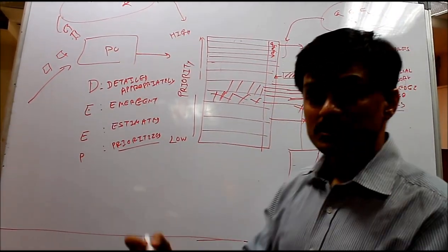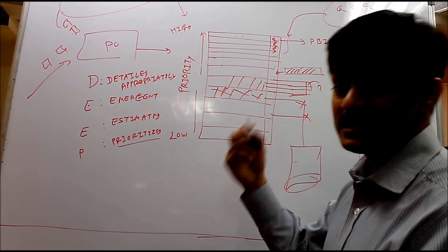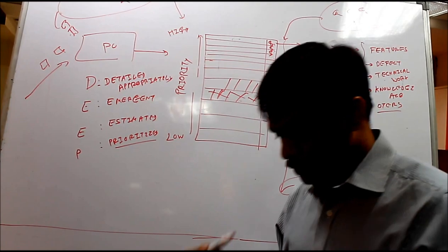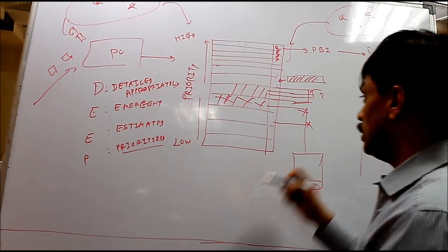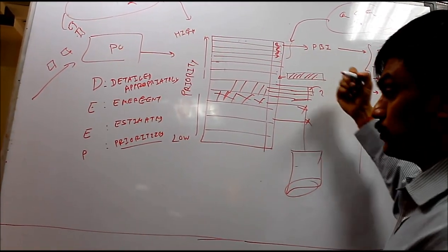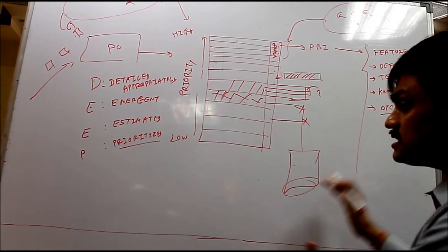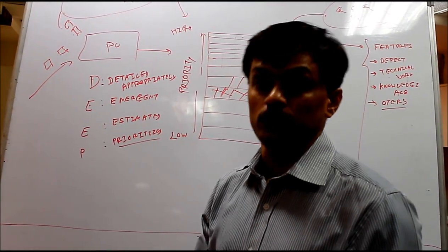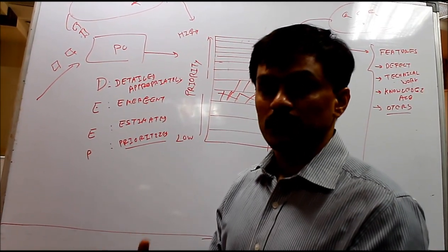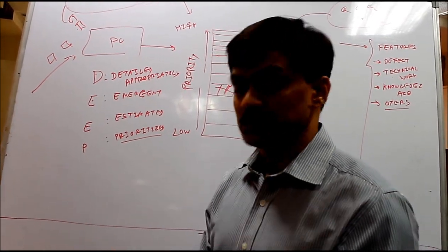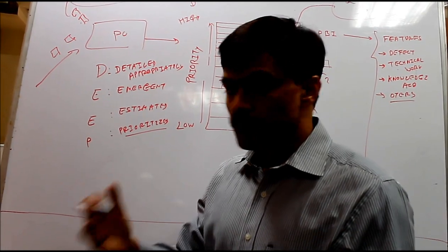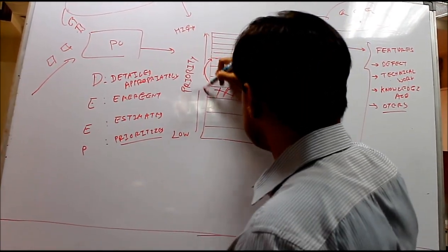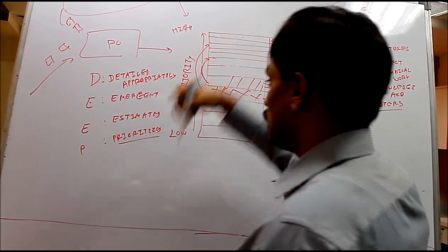The team is required for doing an estimation, because other prioritization activity can be done by the product owner, but the product owner will need support of the team in order to estimate these product backlog items. And after doing all this, priority keeps changing. The product owner keeps changing the priority on the basis of business need, and that is what Agile is all about. We welcome change till the time it helps the business to move faster and be profitable. So the reprioritization happens as a part of product backlog grooming activity.